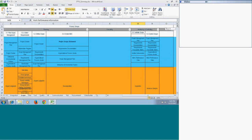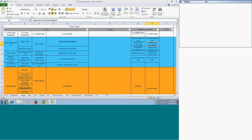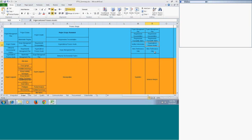For Control Scope, the inputs are the project management plan, requirements documentation, requirements traceability matrix, organizational process assets, and work performance data. The difference between Validate Scope and Control Scope is important: in Validate Scope, you give verified deliverables to the customer for their inspection, but in Control Scope you are continuously monitoring whether your project is within scope or if scope creep is happening. Scope creep is when the scope goes out of control and you keep adding different things to your project.